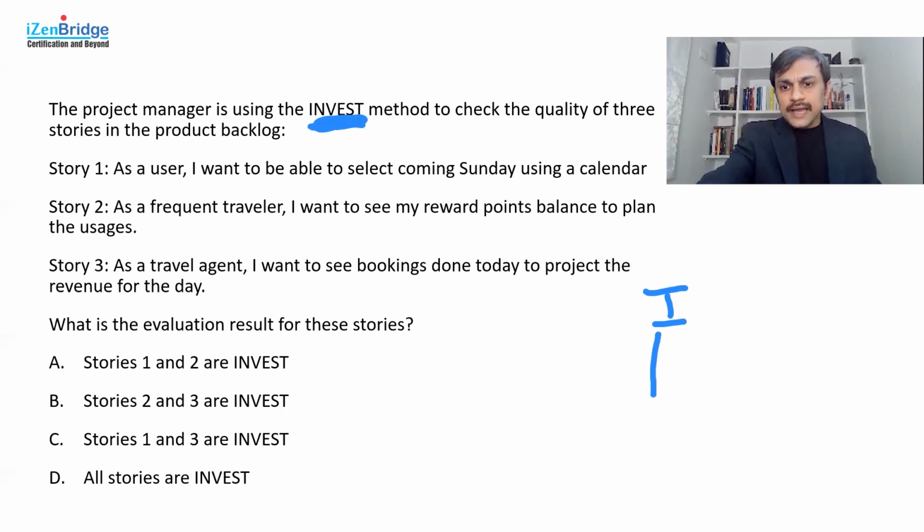Now, N stands for negotiable, which indicates that stories may get negotiated while the execution is happening also. Some acceptance criteria may get clarified. It's never late to fix the user story. Even if it is under ongoing development, it's never late. We should be able to talk about it all the time. There is no bureaucracy attached to the thing which is defined in a user story.